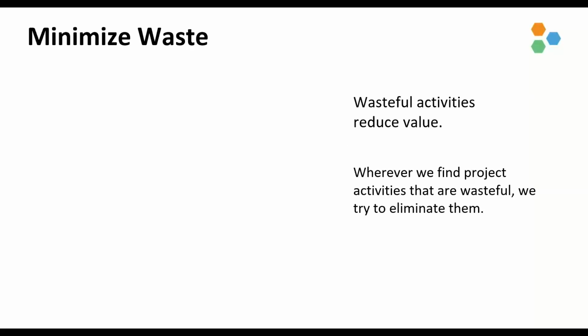Wasteful activities reduce value. I don't have to tell you that. This is why Agile methodologies have adopted the lean concept of minimizing waste and other non-value adding activities. So for example, while the project is being executed, an Agile team might reduce or postpone activities that are maybe required by the organization, but not directly focused on delivering value, like formal time tracking or reporting.